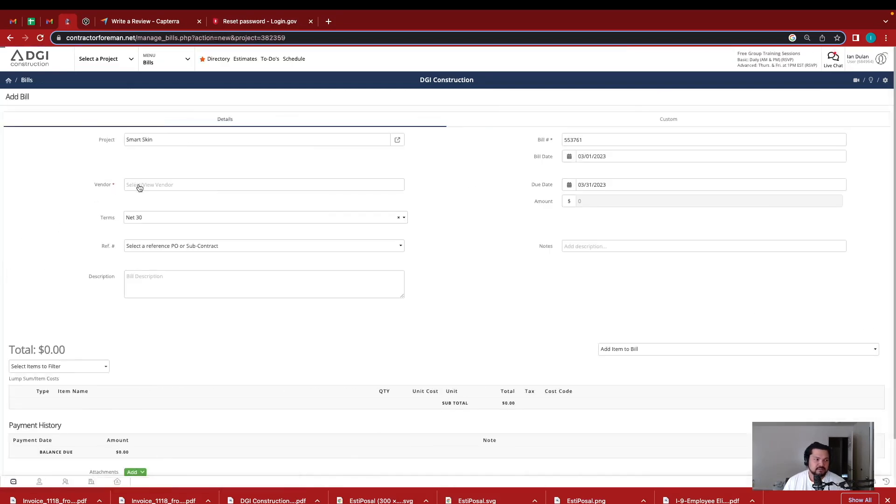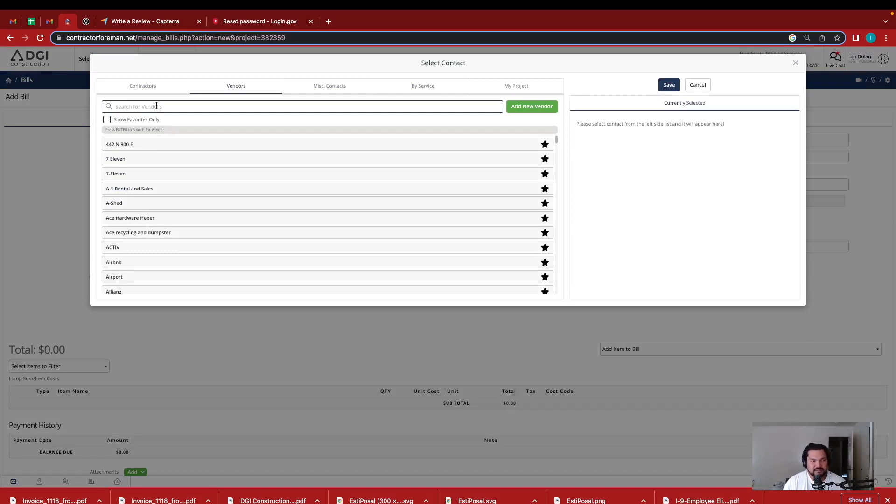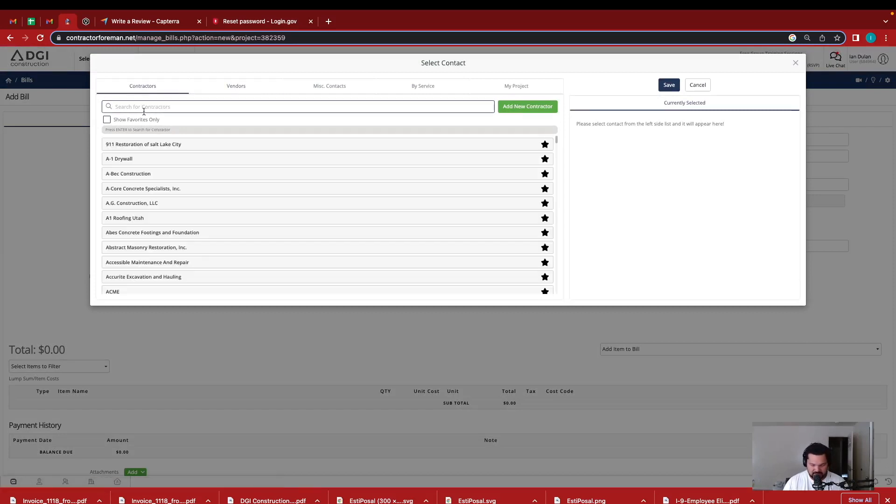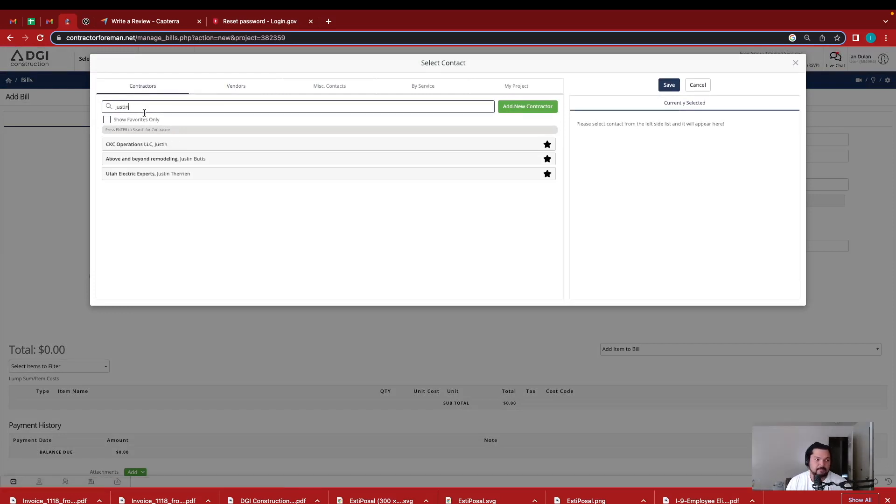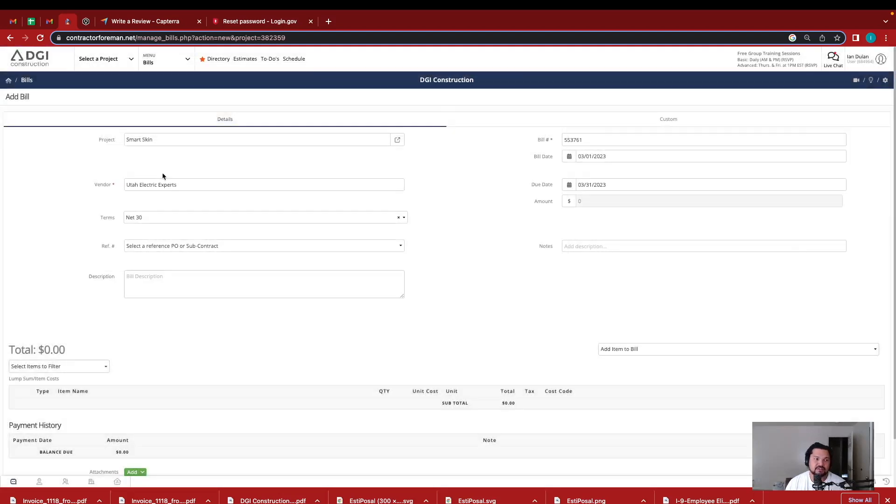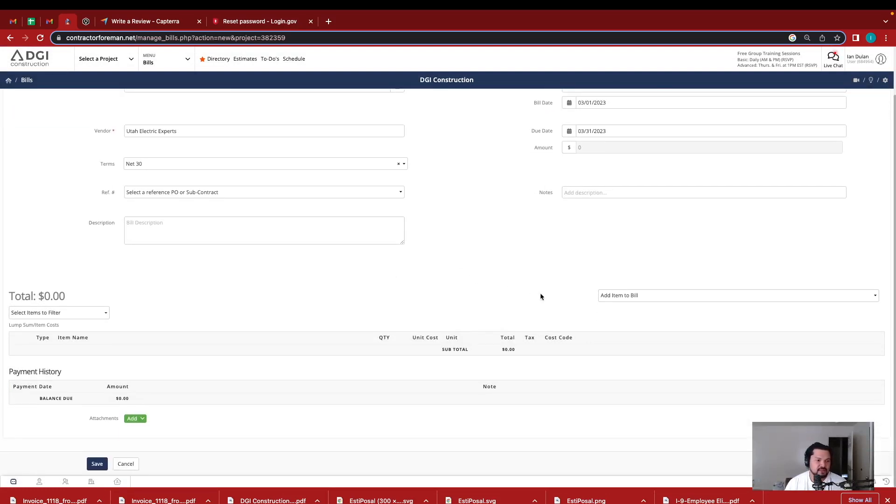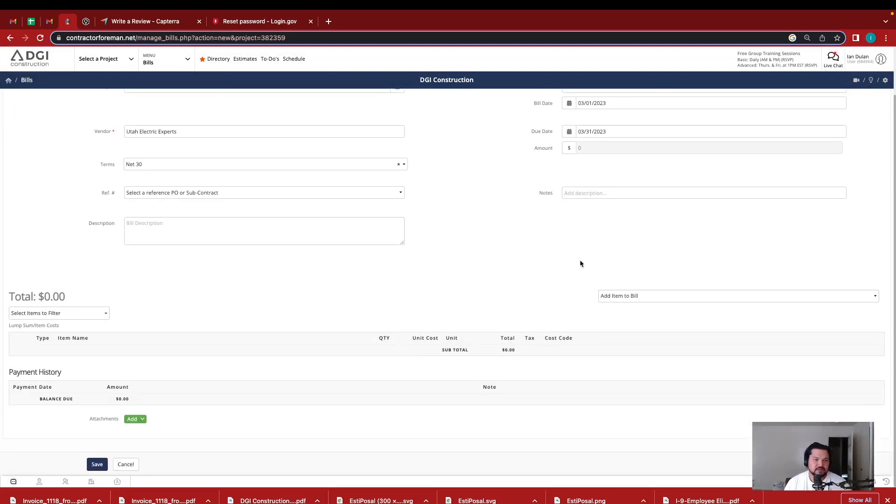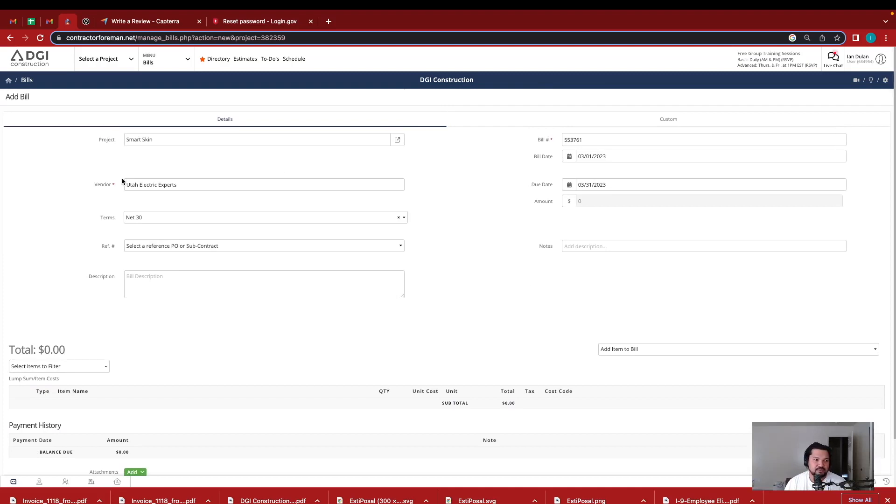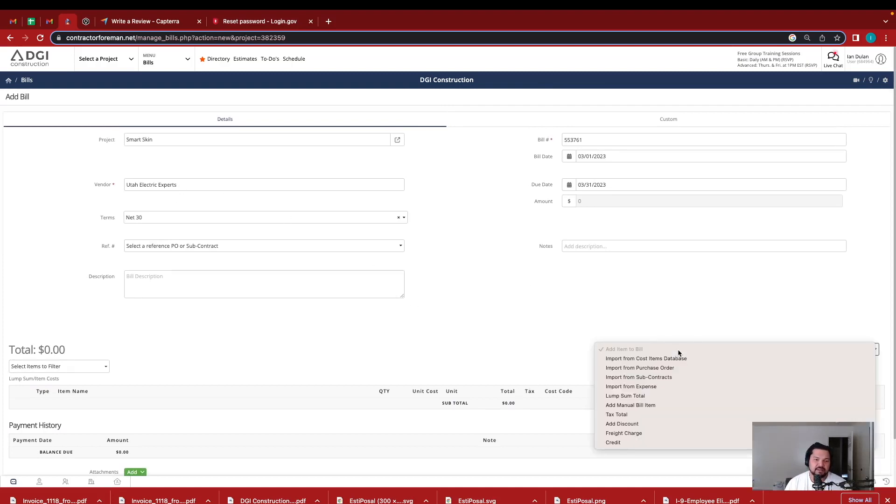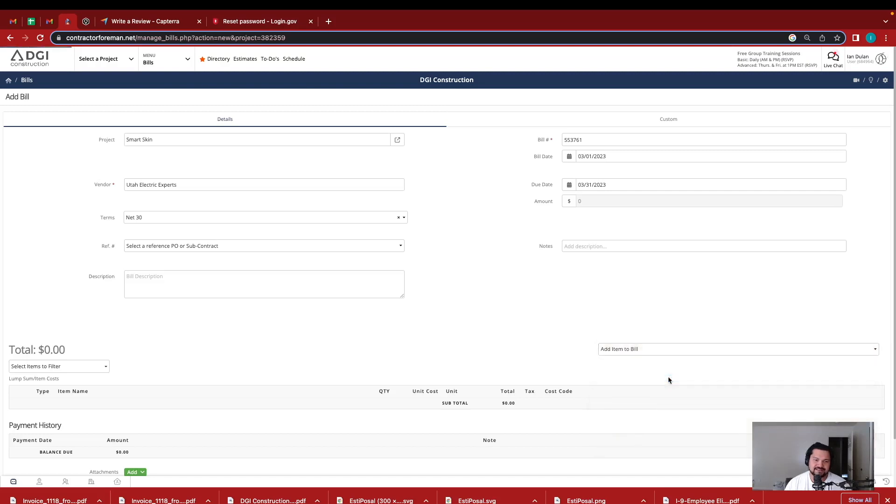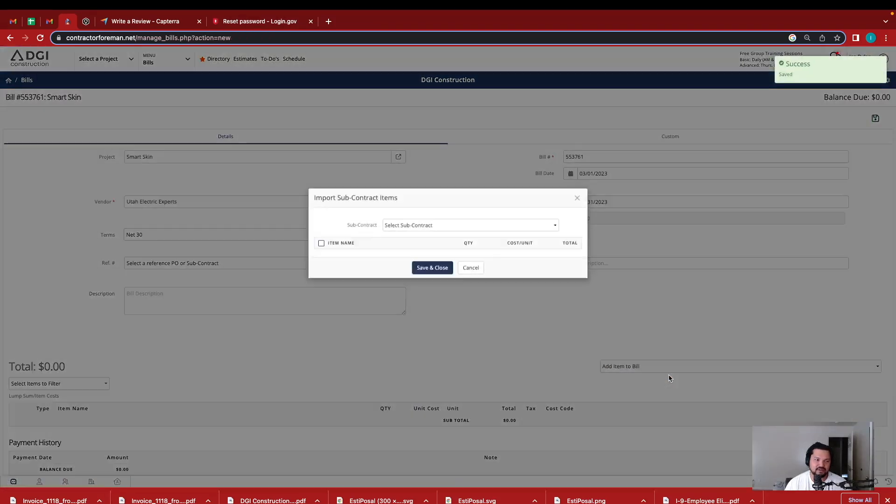So I select this vendor here. It's a contractor. But I had already signed a contract agreement with Utah Electric Experts. So now I put his information in here. Instead of manually inputting a bill, I can pull it from the subcontracts that I signed with him.